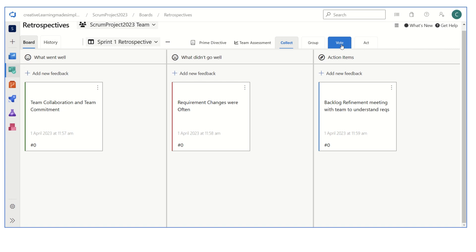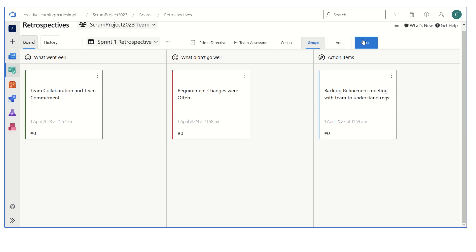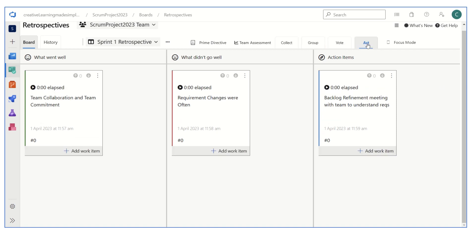Let's say the team has collected some ten areas of improvement or ten action items. Out of those ten, what are the ones which are really important? As a scrum master we can ask our team to vote, and based on the highly voted items we can take an action.